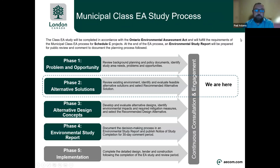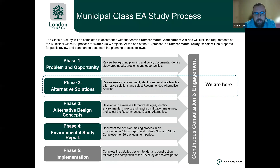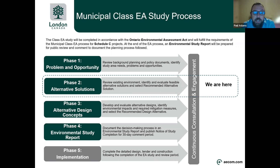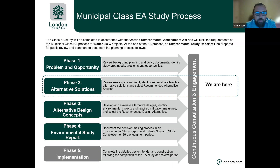The municipal class EA process is in accordance with the Ontario Environmental Assessment Act. Because this project has potential for larger environmental issues, it's classed as a Schedule C project, which is required to follow all phases of the environmental assessment process. The first phase is the problem and opportunity statement — this is where we review background information, look at what the issues are, and come up with a statement that helps lead the project forward. We're now in phase two, which is the alternative planning solutions, where we review existing conditions, identify feasible alternative solutions, evaluate them against a set of criteria, and come up with a recommended alternative solution to move forward into phase three.